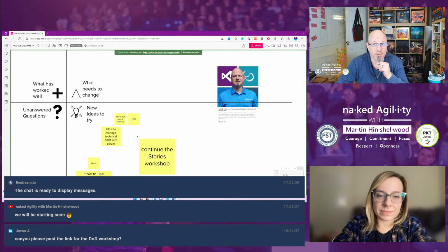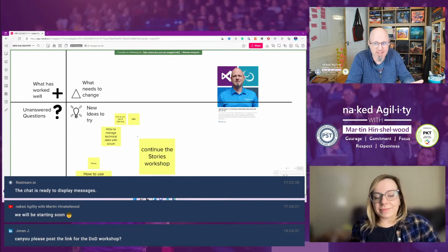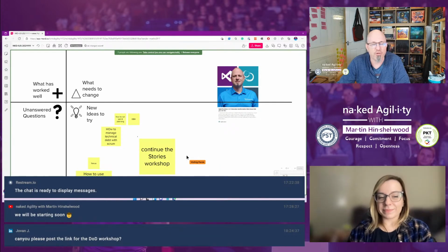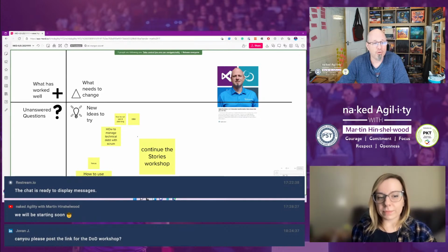Remember lean inventory control for your backlog, right? If you've got too many things on your product backlog, the product owner can't know everything. So if their accountability is maximizing the value, it can be very difficult to find it, like a needle in a haystack. Where's the value? I don't know, because there's 5,000 things in the product backlog. So definitely apply some sort of lean inventory control. You want a minimum of stuff in there, just what you need. Maybe what you've got is what you have to have, but maybe it could be less.